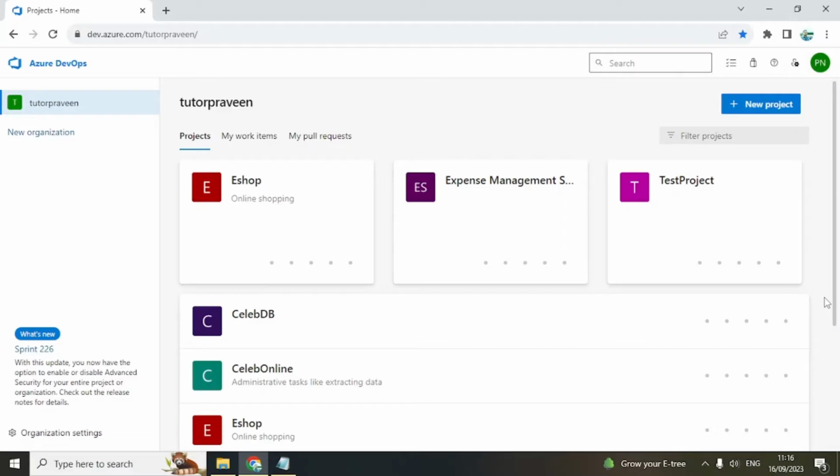But another way is to do the development and publish it to UAT, where it is not live, but the actual users, or users who are very close to the end users, get an opportunity to test it and provide feedback. You again do the development, move to testing, again move to UAT, again get feedback, again go to dev. So you continue this cycle between dev, SIT, UAT. Once you have a product which is robust and good, and you are satisfied, then move it to production.